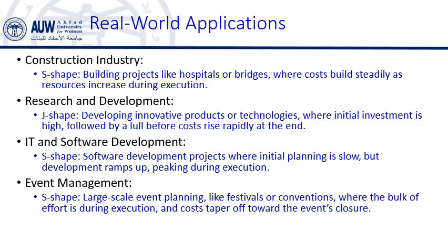The first is the construction industry, where the S-shaped life cycle is the pattern of the stages from conception to completion. The S-shaped life cycle is very common in the construction industry as projects often involve a gradual increase in effort and cost during the middle phase. The planning and design phase starts slow, then construction execution picks up pace, and cost tapers off once the project nears completion during the closure phase.